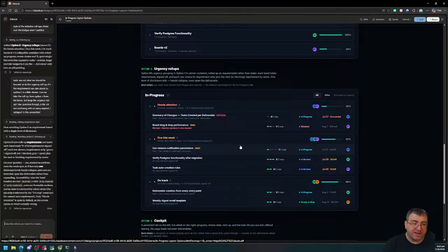Like, is needs attention that there's a review date on the deliverable and it's overdue, like that one says, or is it there are a number of tasks attached to it, but none of them have moved to in progress for a certain amount of time, and therefore there's a higher risk that the review is going to be off.